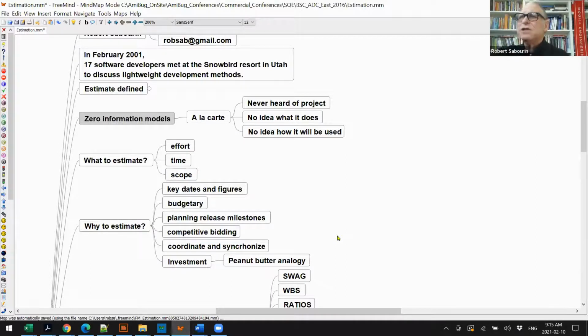And then once I've got that, I'll look at two dimensions. And this is my habit. You could look at more dimensions, but two is nice and practical, and also non-technical stakeholders can grasp it. Usually the dimensions are size and complexity. For a non-technical stakeholder, size has to do with usually the number of controls, the number of options, the number of things you can do. So that's a size notion. And complexity has to do with the type of algorithmic complexity, the type of research elements, the type of business rules behind it. So are they complex, simple, or typical?